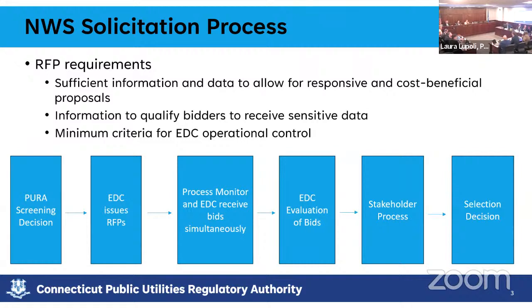That's definitely something we can talk about. But I would also argue that, if such a vendor, battery name brand behind the meter producers, without naming anybody here specifically, they have very good data themselves on how these batteries occur. So I would always encourage them to go into the bid and say, based on data we have from the 10 million behind the meter batteries we have in the system, if an event occurs, we see 80% participation, 75% participation. We're going to put a 5% security margin on that, call it 70. We're bidding in this much. So that can definitely be contemplated.